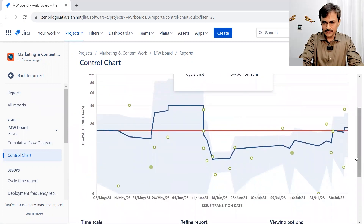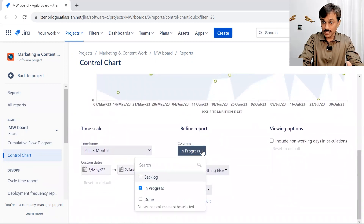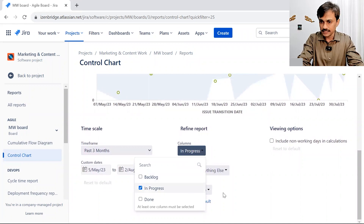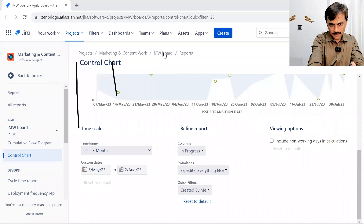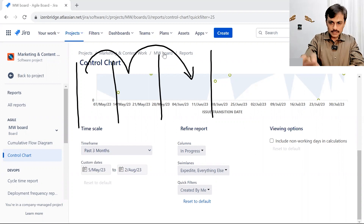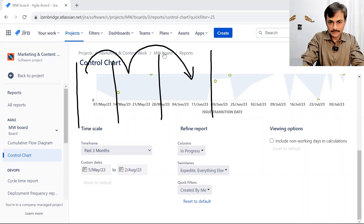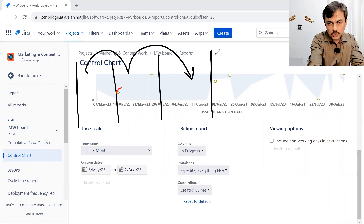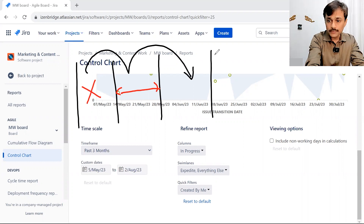Now, what is cycle time and how does it differ from lead time? Here you have columns — the critical ones. By default it comes as 'In Progress.' In my board I have three columns: Backlog, In Progress, and Done. If I select only the In Progress column, I am measuring how much time was spent at that particular stage — it does not count the time spent in Backlog. As soon as an issue enters In Progress the timer starts; as soon as it leaves, the timer stops.